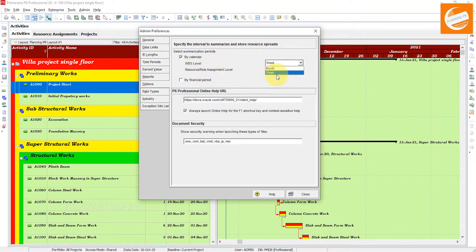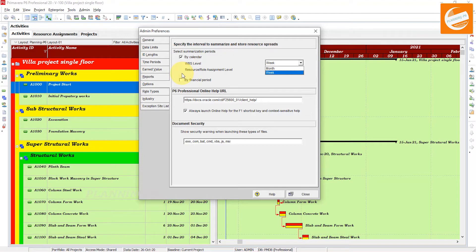There are two options here: month and week. Then there is the 'By Financial Period' option. Choose 'By Calendar' if you want to summarize and store activity and resource spreads according to the calendar intervals you specify in the WBS level and resource/role assignment level fields. This option is selected by default. Note: if you summarize a project with the 'By Calendar' option selected and then clear the checkbox and summarize again, the previously existing summary activity and resource spreads are not removed - you must remove them manually.